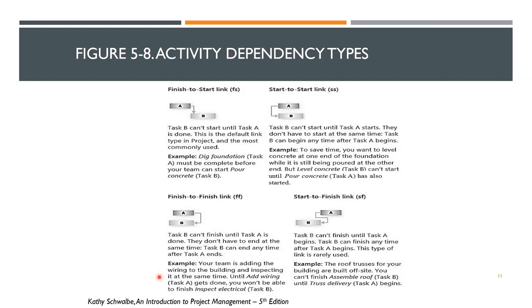Sir, please, one more time. Yes, so you have five rooms for electrical installation, and you are installing electrical wiring, and you've done three rooms. On that day, the inspector is supposed to come. An inspector comes to check your wiring, and he says, I can't finish today. I'm not going to start because you haven't done the wiring yet. But you say to him, okay, it's only going to take me 1 hour to do this room, 1 hour to do this room. So you can start on room number one, and then do room number two, room number three, and I will finish these other two rooms while you are inspecting these rooms.